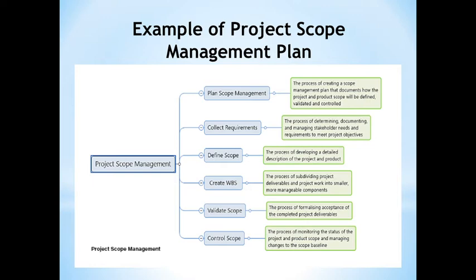Next is validate scope: the process of formalizing acceptance of completed project deliverables. We validate scope against the acceptance criteria defined between you and the customer for each deliverable that you are producing by the end of each phase in a project life cycle. It is important to define the acceptance criteria very clearly.